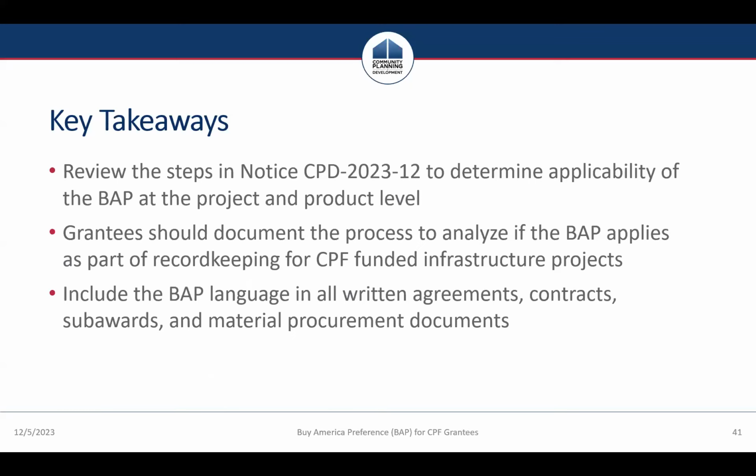We also strongly encourage you to review the steps in that CPD Notice 2023-12 to determine the applicability of the BAP at both the project and the product level. And remember, Chris walked us through all of those steps with the flow chart earlier in this session. Additionally, be sure that you document the process to determine if the BAP applies. You actually want to have that determination written and in your file, because record keeping, as always, is critical on